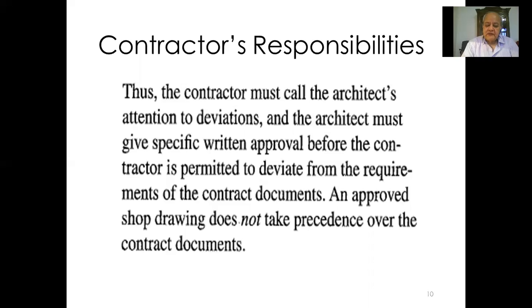Your approval also is in writing. So you receive a letter with the drawings from the contractor, and then you return it with a cover letter with the approved documents. So there are hundreds of documents and letters going back and forth. That's why we say communication and management is very critical at this stage.